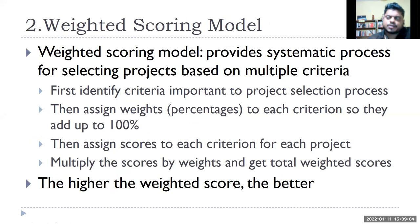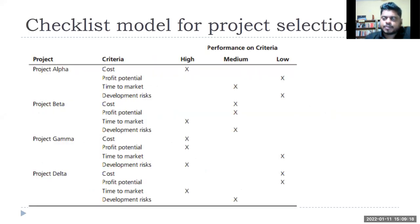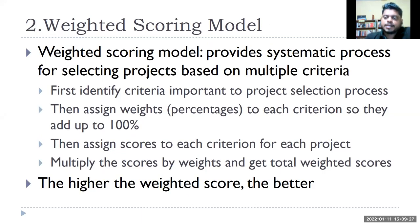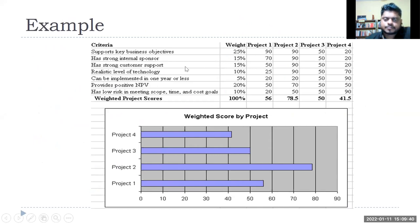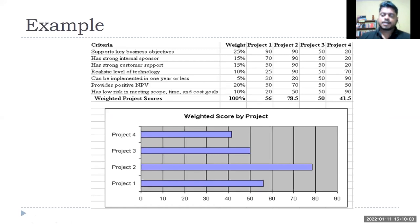The weighted scoring model differs from the checklist model only in that you now assign weights to those criteria — and that needs to be decided in the beginning. In the weighted scoring model you choose criteria and also assign weightages to them. For example, criteria might include: whether the project supports key business objectives, whether it has a strong internal sponsor — which is actually a very important parameter, since most projects fail without an internal sponsor who supports the project from top management level.